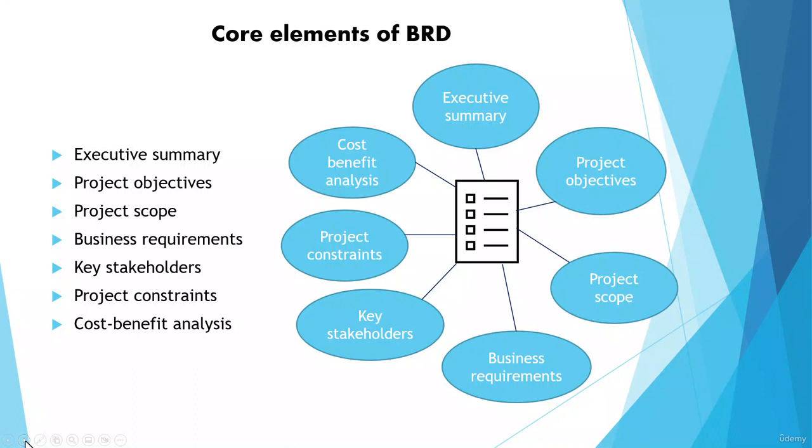So, what are the objectives of the BRD? It is to gain agreement with the stakeholders, to provide a foundation to communicate the solution needs to satisfy the customers' and business needs. It is to provide input into the next phase of the project. It consists of an executive summary, project objectives, project scope, business requirements, key stakeholders, project constraints, and cost benefit analysis.